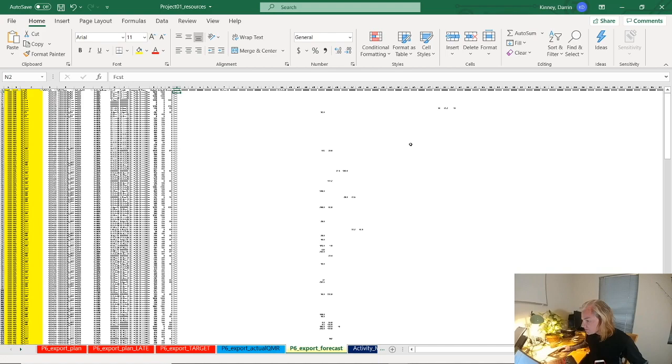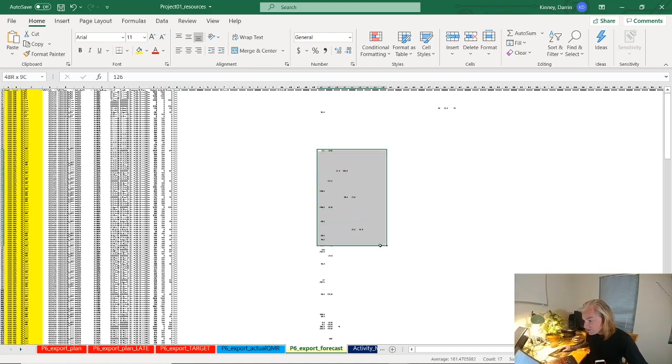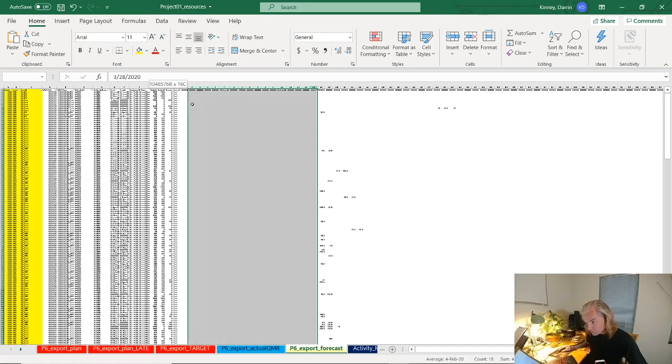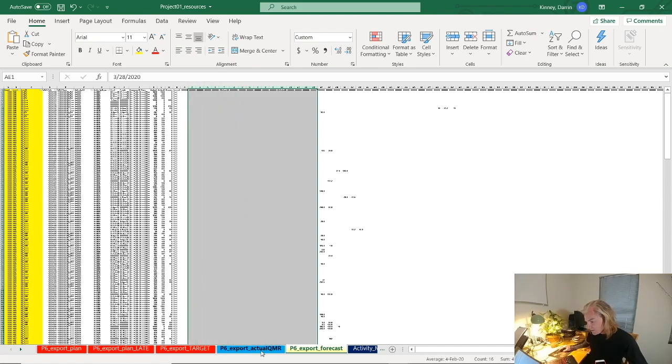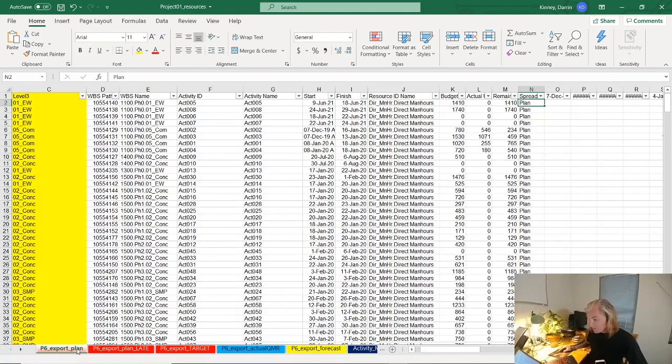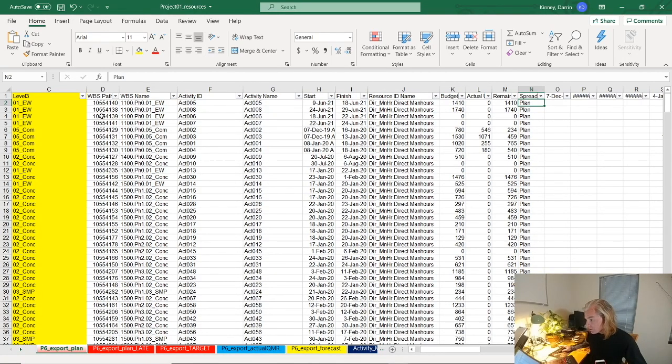This is just going into remaining early units and we can see that this is all the to-go activities, to-go man hours. Obviously you'd be missing some actual to-dates. I've got those in another file called actuals. I've also got a couple other tabs for target plan and late plan. These are all generated in exactly the same way - going into resource assignments from your baseline schedule and copy paste.